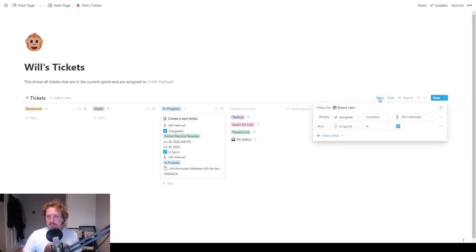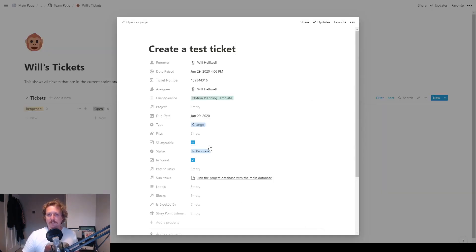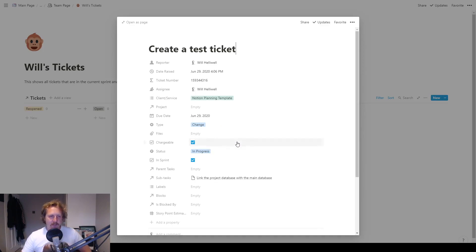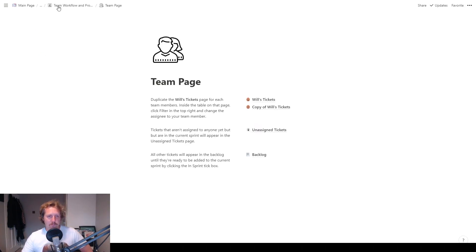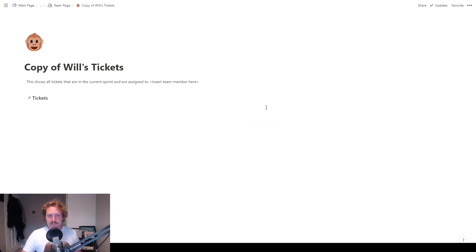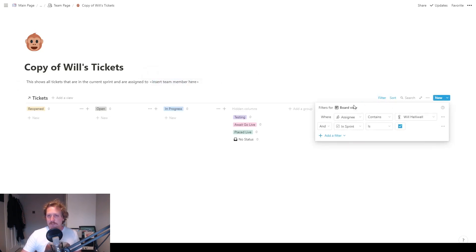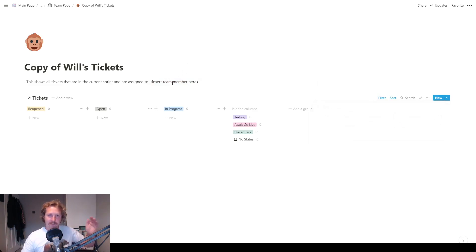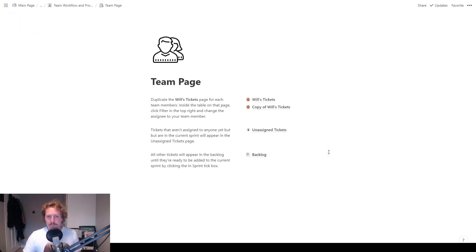If you have a look at the filter, you can see where assignee contains me and in sprint is ticked. So if I took it out of the current sprint, if I decided, no, I don't want to work on this now, I'm going to take it out the current sprint, and then it's gone. So if we want to look at where it's gone, it will be sitting there in the backlog. And we'll go and look at that in a second. So copy of Will's tickets in this bit, you would just assign this to insert team name here and you go to filter where assignee contains and you just change the name in there. So create as many of those pages as you want. And then each team member has a separate page that they can just look at and see all the tickets that they have to do in their current sprint.